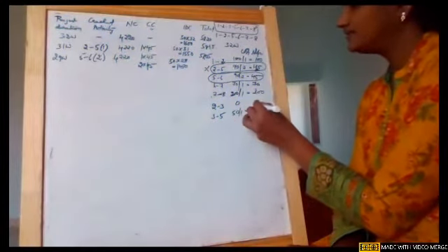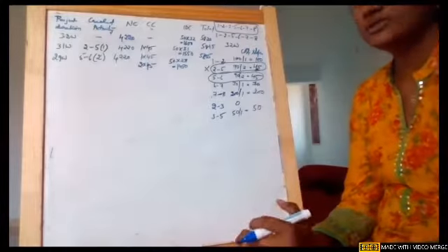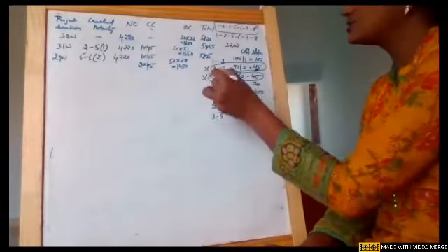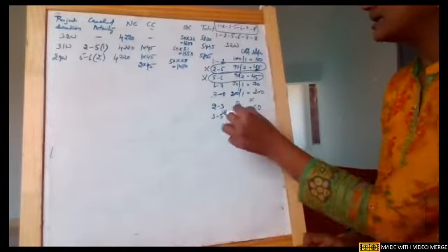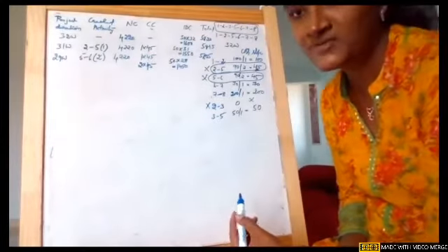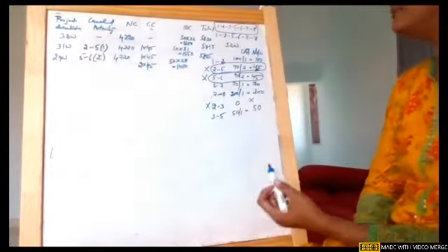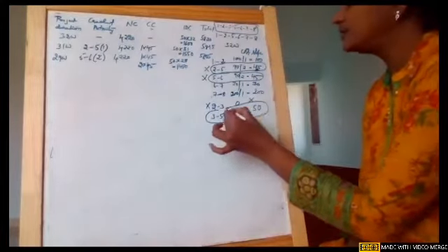which is 50. Okay, so now when we see this, girls, the new network which is to be crashed, the next one, this is also crashed successfully. So 0 we will not consider, girls, never consider 0 as the minimum value, just ignore. When there is a slope of 0, just ignore it, it doesn't show any difference. Now after 45, the next lowest cost slope is 3 to 5.